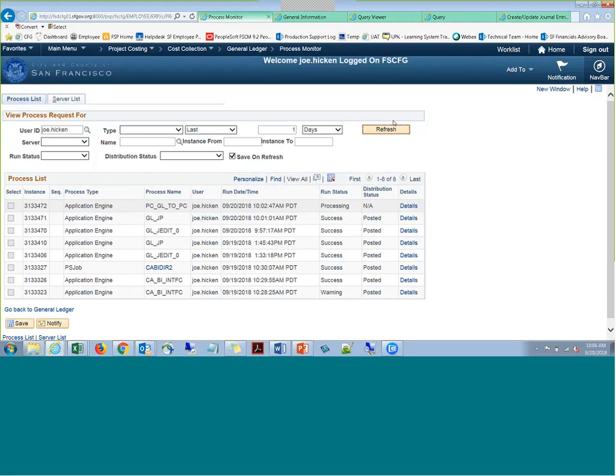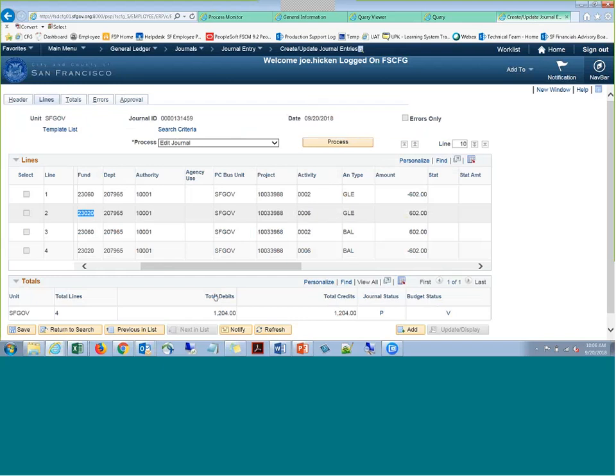Annie asks, what situations or conditions would a user do MND? And actually, Annie's artfully pointed out here that I've done something inaccurate. What I should have done is I should have had an analysis type of MND here on this line to indicate that this is a manual distribution as opposed to an original cost expenditure. So thank you for that. For folks on the phone and for the reporting and for everyone in the room here, for this row here where I'm abating the cost to activity 6, I should have done MND, and I should have done an MNR, manual reversal, for the abatement from.